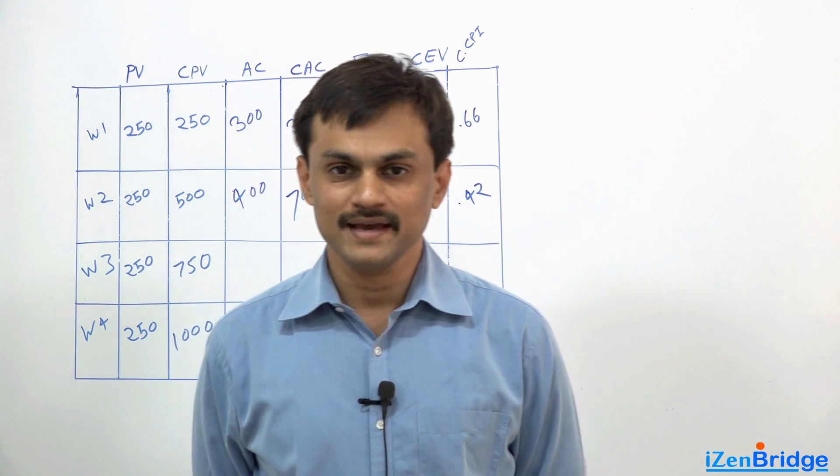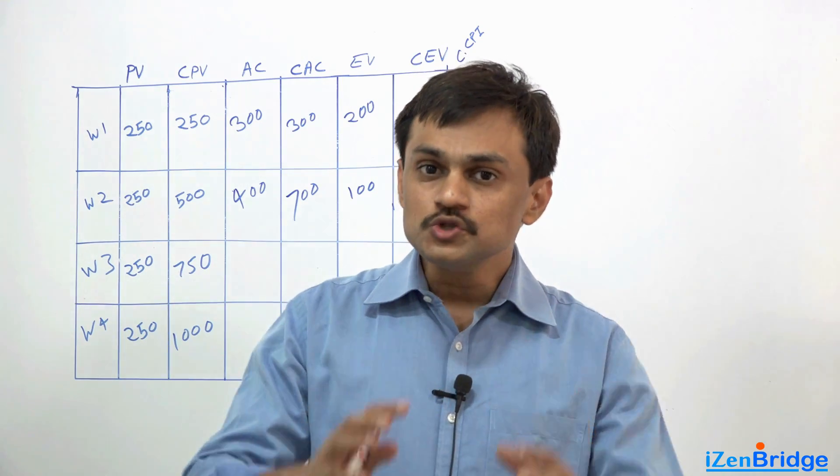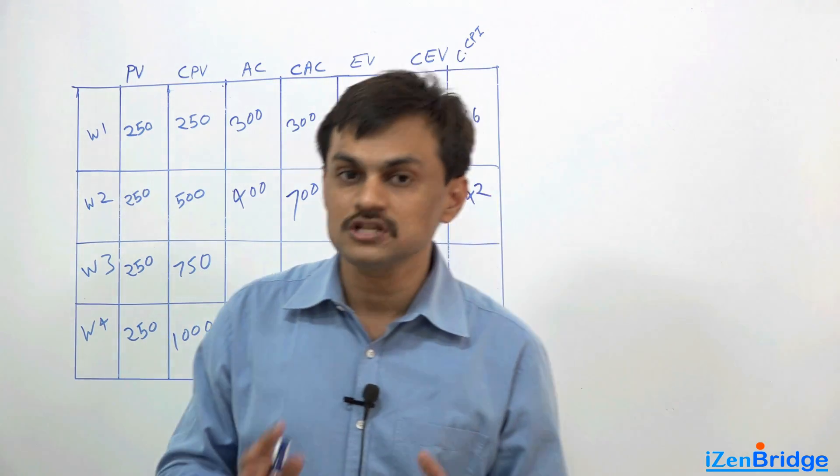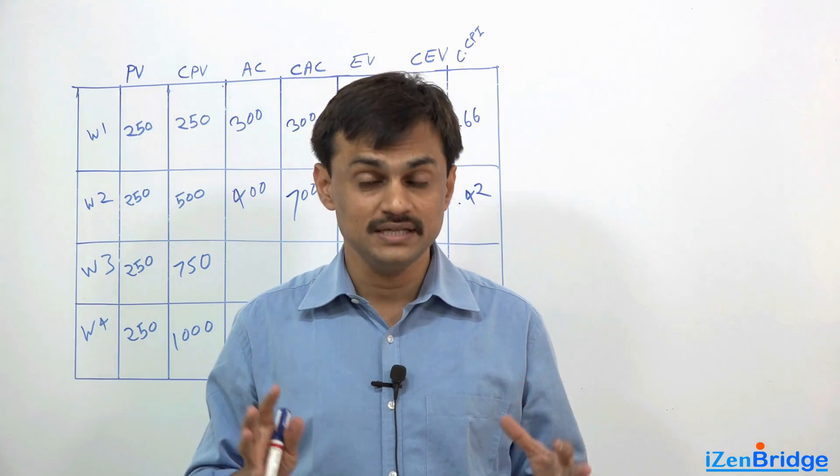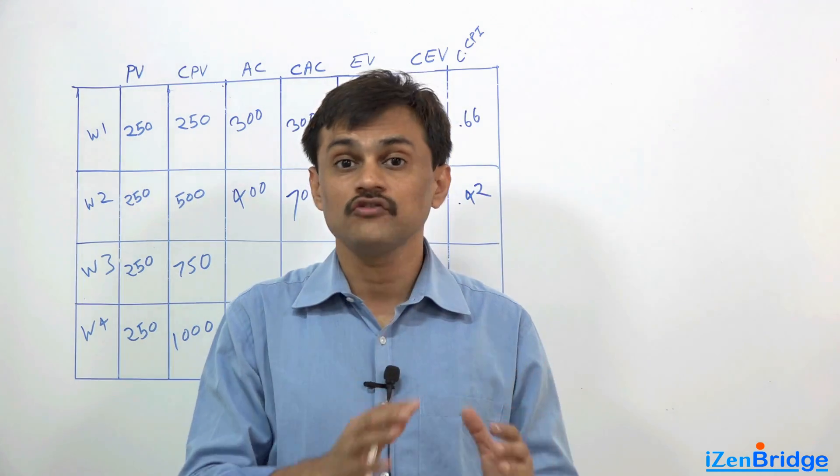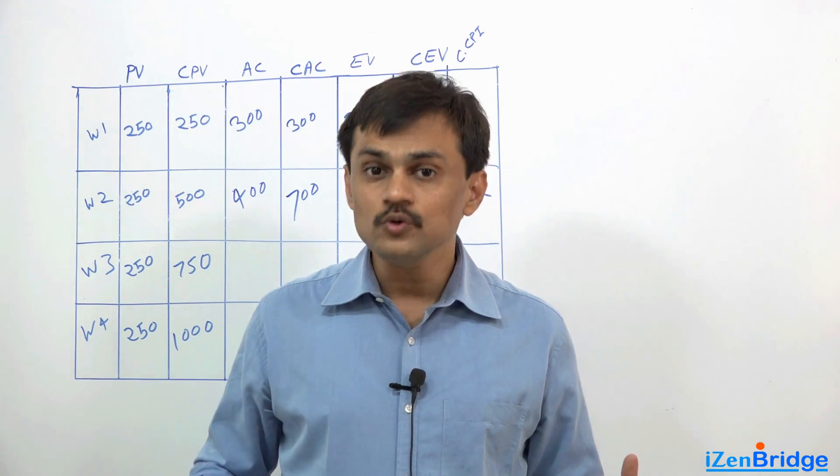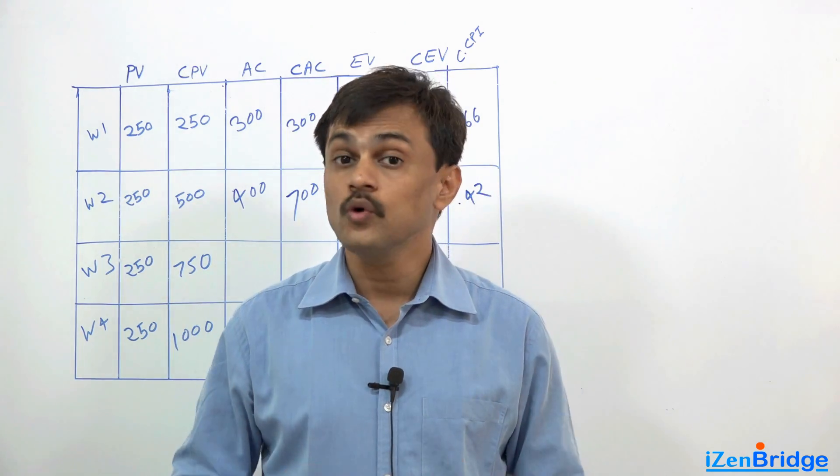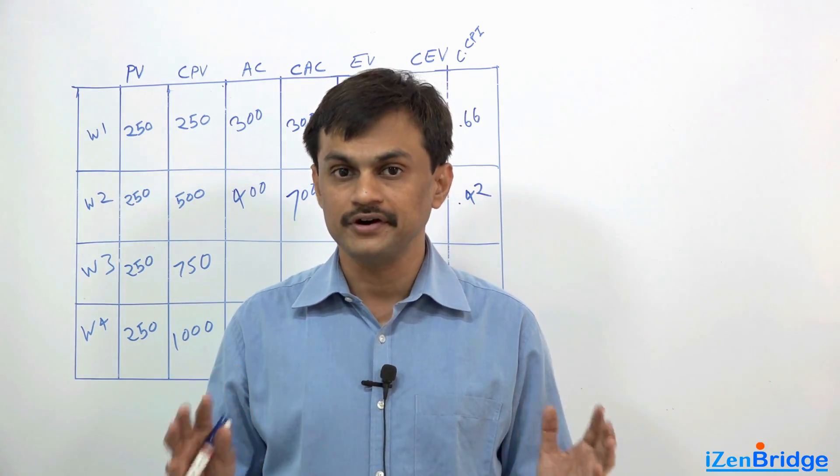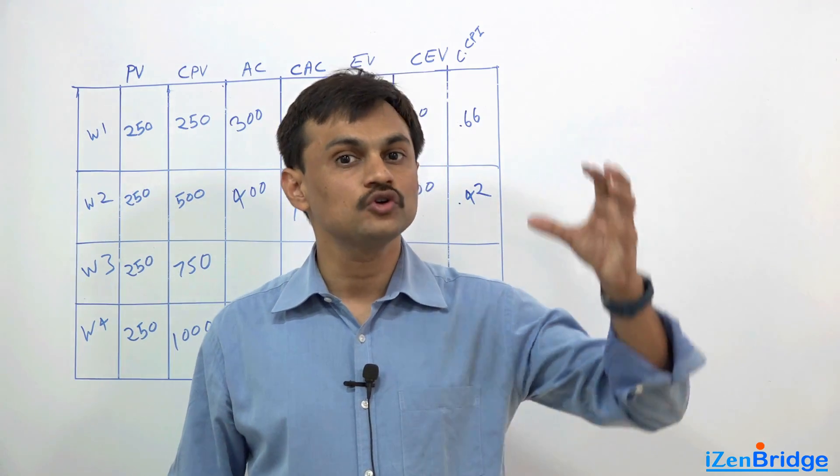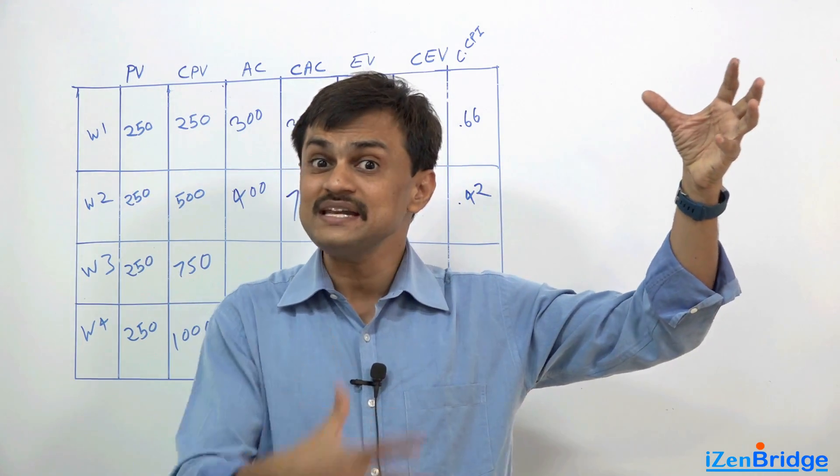To Complete Performance Index is about what should be our desired cost performance index in order to meet our goal of achieving the project in a given budget. The formula for To Complete Performance Index is simple: work remaining divided by fund remaining - how much amount of work left and how much money left.